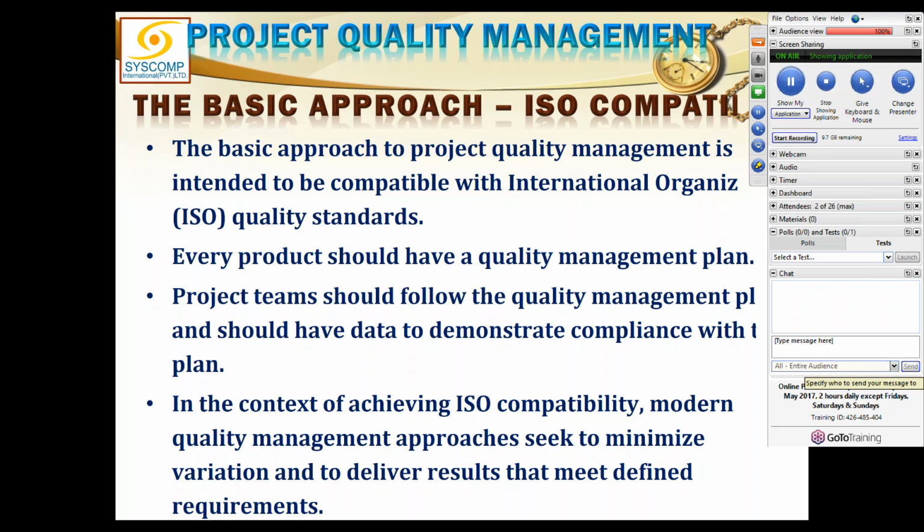Let us say we were able to produce the footballs, but the PSI they could accommodate was plus minus 10. I am still precise, still consistent, but this is not according to the customer's requirement. So I have to improve the quality, reduce the margin, and produce footballs according to the expected standard. Once I complete this order, the next order demands an even more stringent level: they can't afford more than half PSI plus minus. This time I have to further improve my processes, and to produce that quality I will need special equipment, and the price of quality will increase the total cost. As you improve the quality, your cost increases.